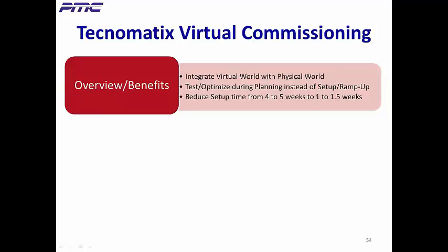ramp up time in a virtual environment that takes into account equipment like robots, PLCs, conveyors, light barriers, etc., without any risk to the real facility. Doing this cuts typical setup and ramp-up time from 4 to 5 weeks to 1 to 2.5 weeks. In other words, time to job one is reduced and problems can be addressed before production starts.